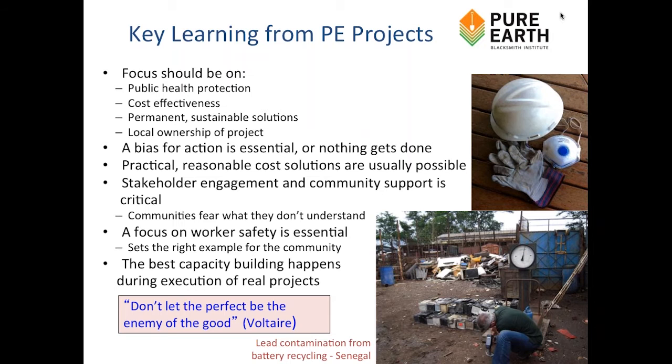Yes, one of the first questions I had was, some countries have different lead in soil standards. In those cases, what should I do when there are conflicting standards? Our general answer is to follow the standard of the specific country that we're working in. So if we're working in Indonesia and their standard is 150 milligrams per kilogram in residential soil, then we try to follow that standard.